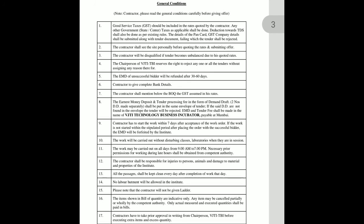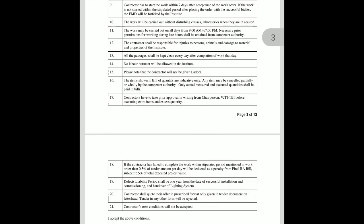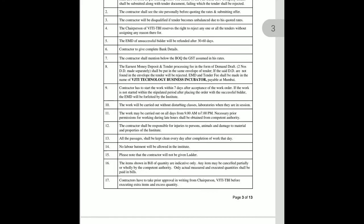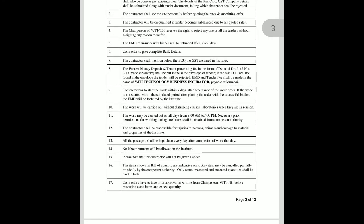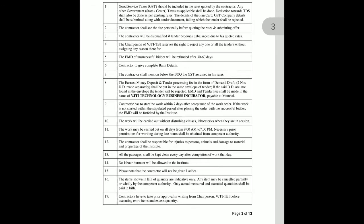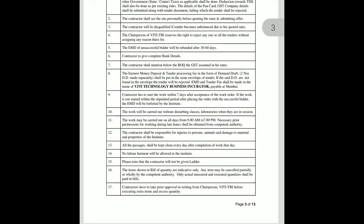The next page contains the general conditions, totalling 21. The first condition is that GST should be included in the rate quoted by the contractor. Any other government, state, or central taxes as applicable shall be done. Deduction towards TDS shall also be done as per the existing rules. So, the GST certificate is very necessary.